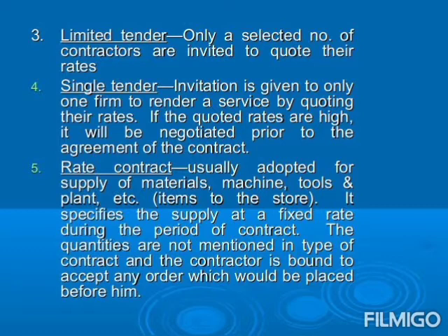Rate contract, usually adopted for supply of materials, machine, tools and plant. It specifies the supply at a fixed rate during the period of contract. The quantities are not mentioned in this type of contract and the contractor is bound to accept any order which would be placed before him.